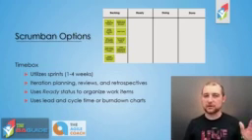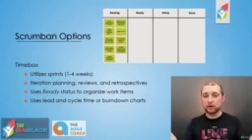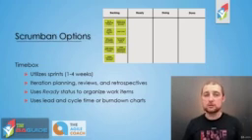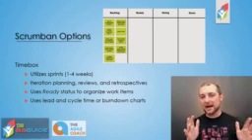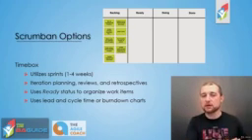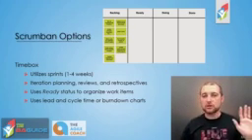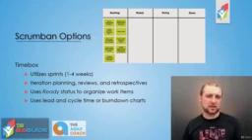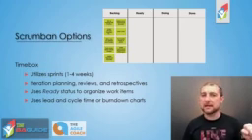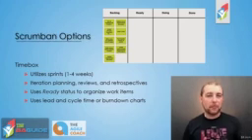Another key difference with the time-box Scrumban is the Kanban board. So if you look at the Kanban board here, our to-do column, our to-do status has changed to backlog. It could also be to-do, it's just text, but a lot of teams change it to backlog because that's what they're used to. The backlog, or the old to-do column, is going to house those user stories and work items that maybe aren't quite fully fleshed out yet. We haven't gotten all the details on it. It might be an idea. We might be starting to talk with various users or stakeholders about what they need in that.